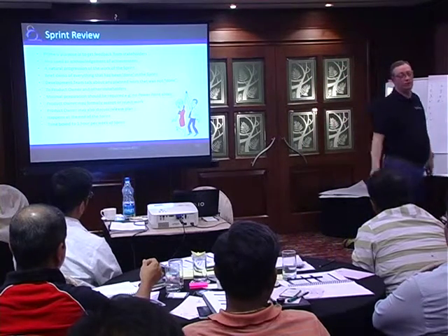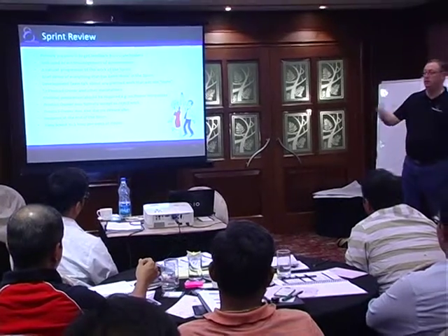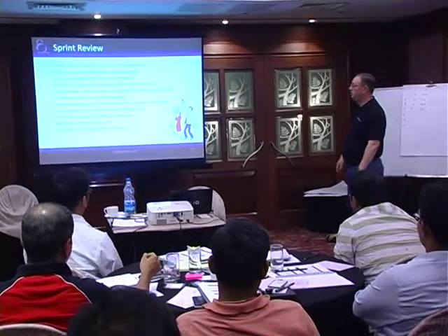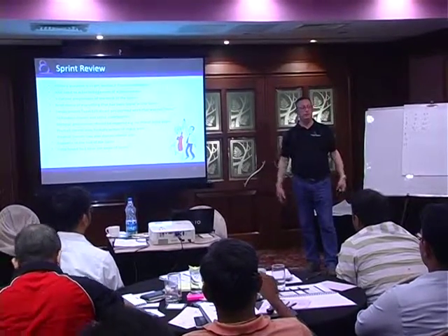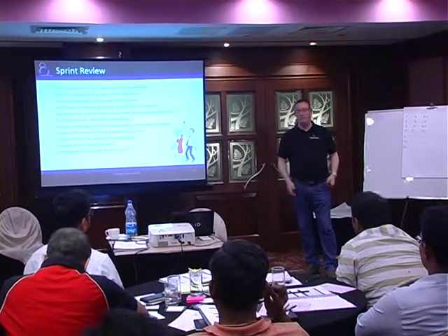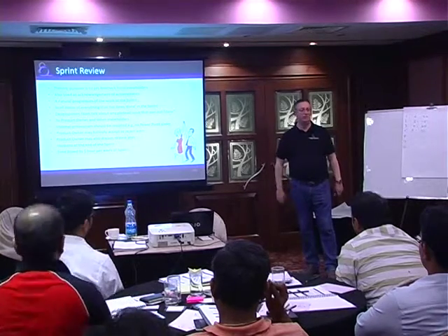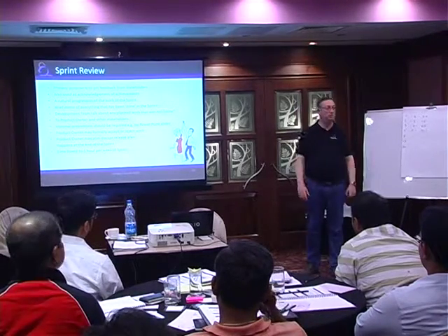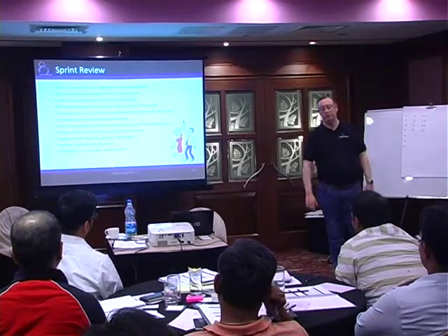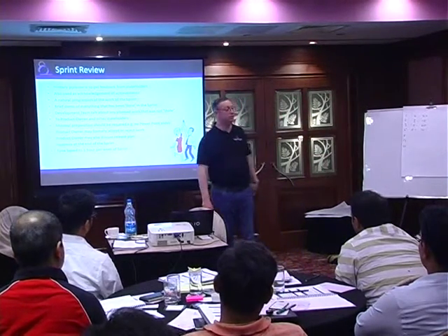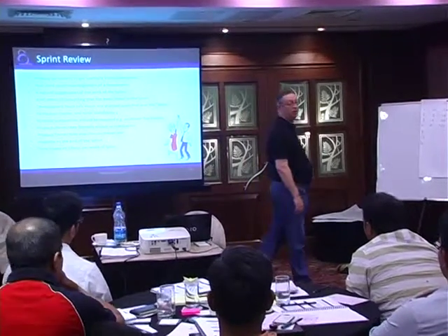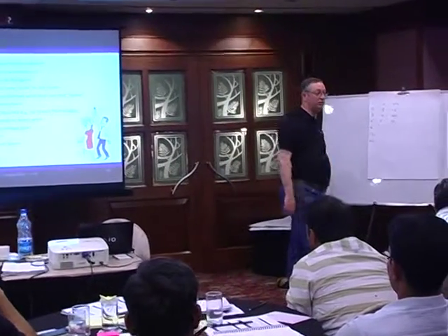This should be a natural progression of the team's work. The team are building a potentially shippable product increment, so they should actually be able to just go in. It's in a production-like environment. It's working software. It meets all the conditions of satisfaction. They should be able to show it to the stakeholders. Which means they shouldn't need to do any more preparation for it than deciding who's going to do what. About half an hour, regardless of the length of the sprint.